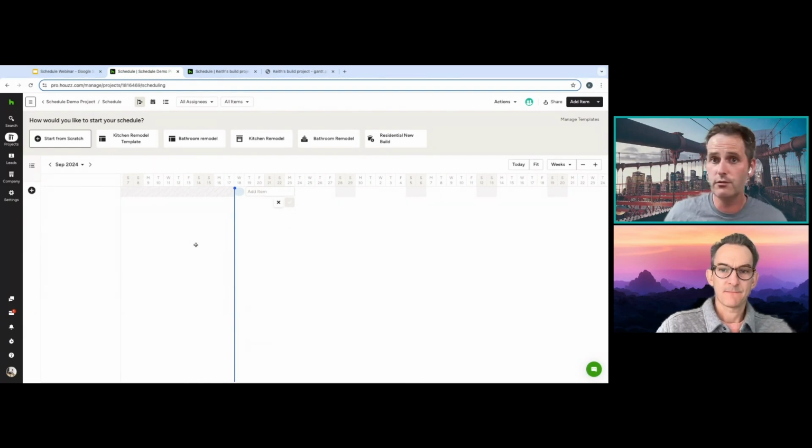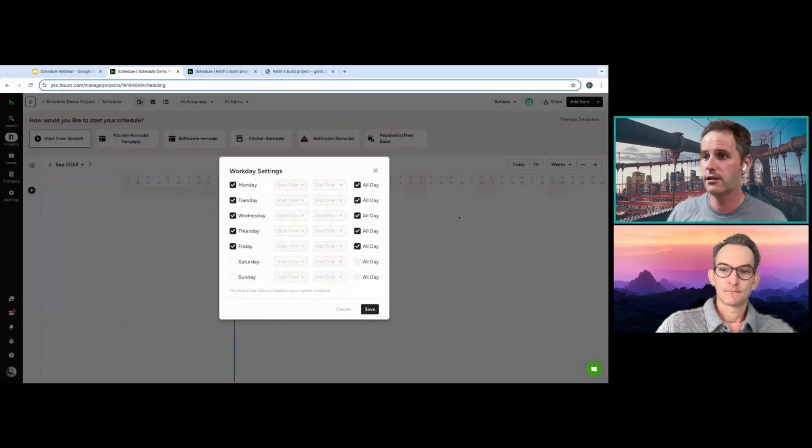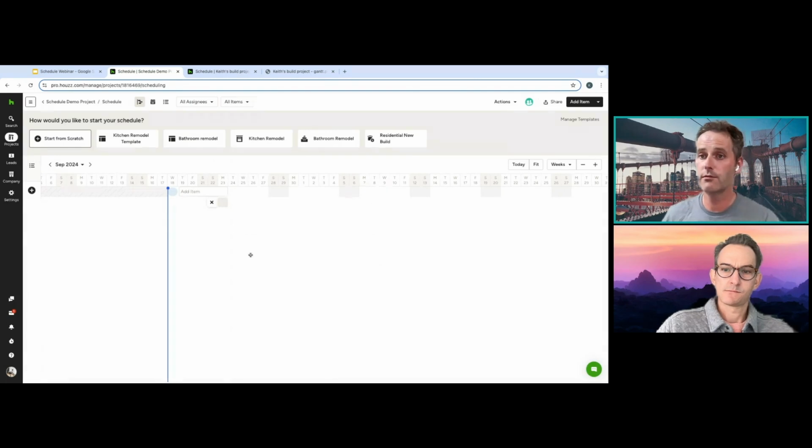But just before we get started, I know that contractors working Monday to Friday is kind of normal. Some people work Saturdays. So we jump into actions up here, and we have workday settings. You can see on my screen I have Monday to Friday selected. If you want, you can select Saturday. You can select just a half day Saturday. You can do Sundays. But for now, we'll just leave it Monday to Friday. All right, so we're going to go ahead and add our first item.